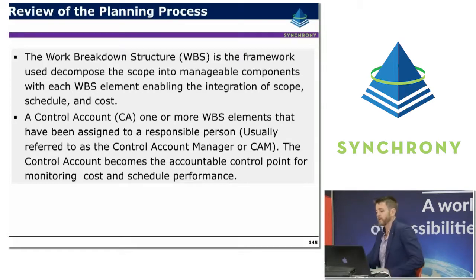The control account can have one or more of the WBS elements assigned to it, but it's assigned to one particular person, a control account manager, to be responsible for that performance. And the control account becomes the accountable control point for monitoring cost and schedule.